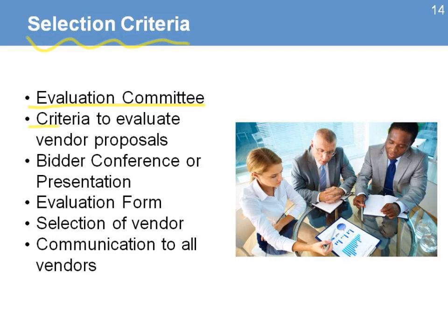You can also include a bidder conference or presentations. Here is when something that you need them to demonstrate or show or discuss. And it's a good opportunity for the evaluation committee also to ask questions, especially in terms of certain characteristics about the quality of the services or the goods they're going to be providing. And that also provides you more information to do a better evaluation of all those proposals.